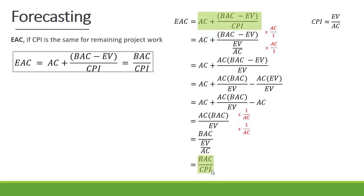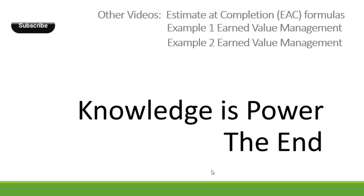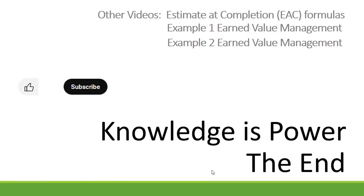So if the CPI is the same for the remaining project work, then the estimate at completion can be calculated as actual cost plus budget at completion minus earned value, divided by CPI — which simplifies to budget at completion divided by CPI. I hope this video helped you to better understand where the formula estimate at completion equals budget at completion divided by CPI comes from.